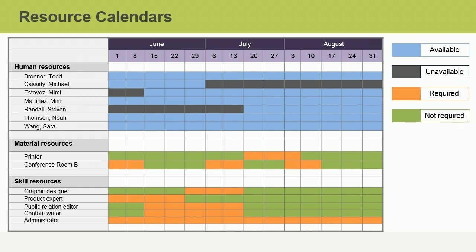Resource calendars show the people, equipment, and materials that can be assigned to activities. Specific types of workers or equipment may be more efficient than others in completing an activity, and this affects duration estimates. It's not so much the availability or unavailability of resources, but rather the resource capabilities or skills that make the difference in terms of duration estimates.